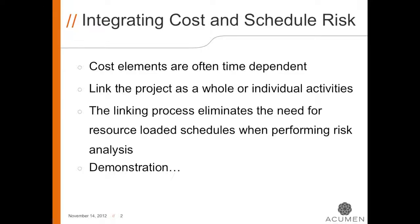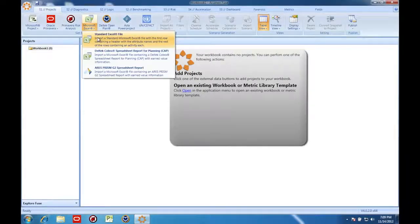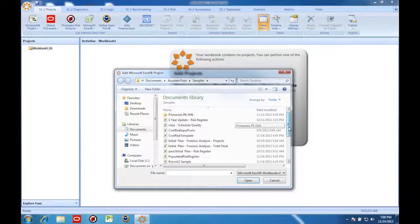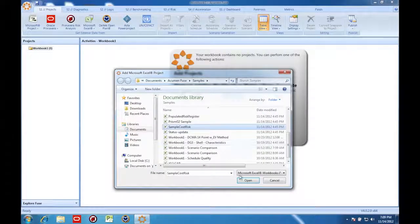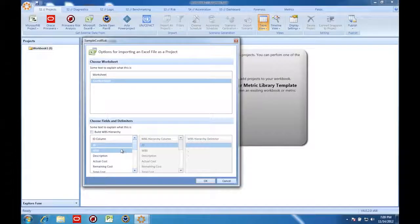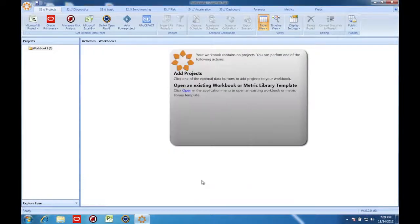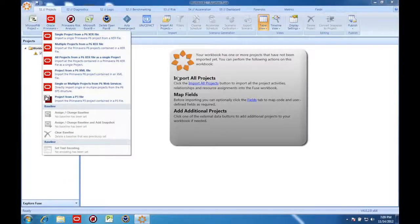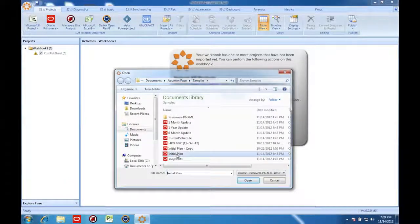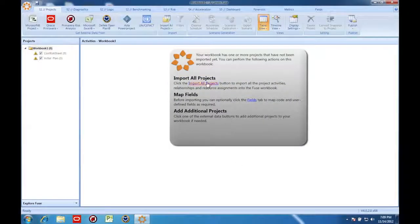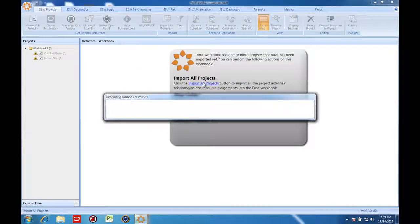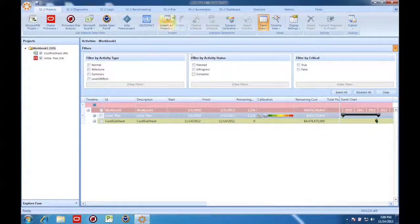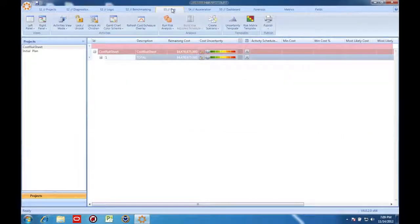Now on to the demonstration. I'm loading a cost model into Acumen Risk from Excel. The Acumen Risk software comes with a template that shows you exactly how to prepare cost information for the import. Now I'm going to load a schedule. Even though the schedule is from Primavera, it is going to be very easy to link the Primavera schedule data with the Excel-based cost data. Now that I've loaded the cost model and the schedule into the system, I'm going to move over to Acumen Risk.